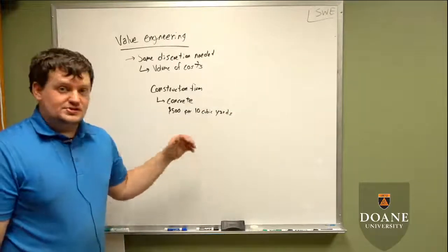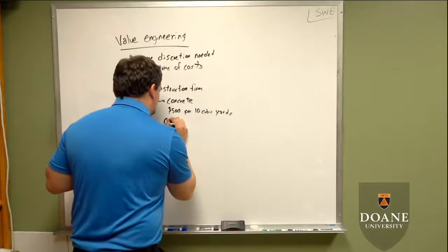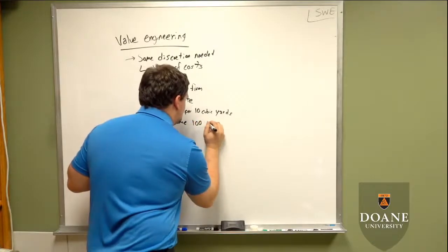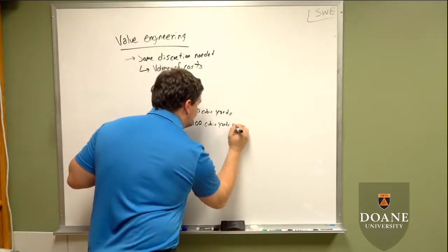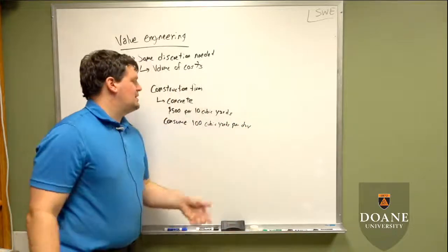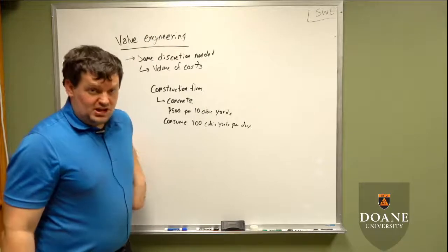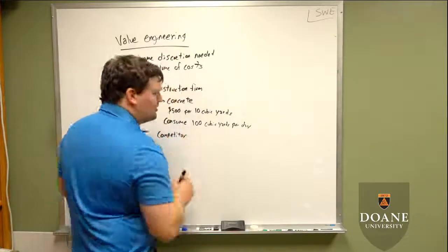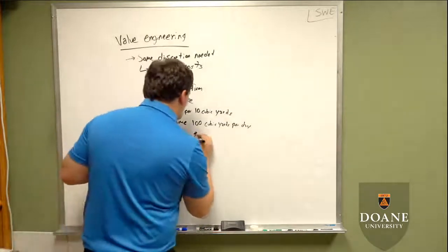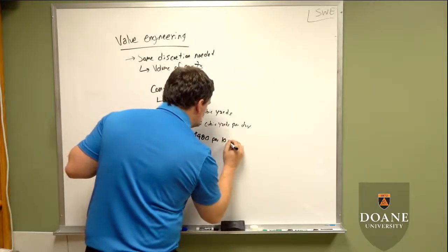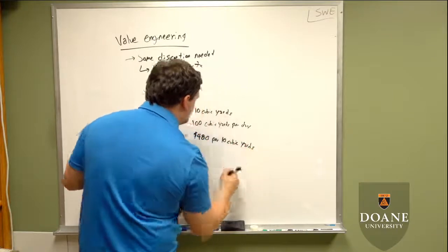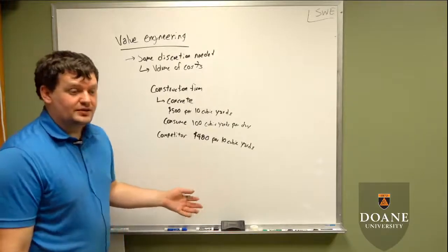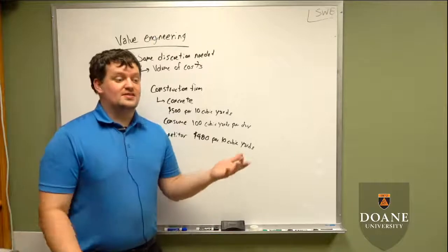But when you're building bridges and buildings and you consume maybe 100 cubic yards per day. Okay, means you're spending $5,000 on concrete daily. All right, but then your competitor to that company comes in and maybe they're a little shady, but they're offering you $480 per 10 cubic yards. Okay, $20 difference. Well, that's $200 a day, just savings in concrete. Okay, for an engineer, like, all right, save money, $200.